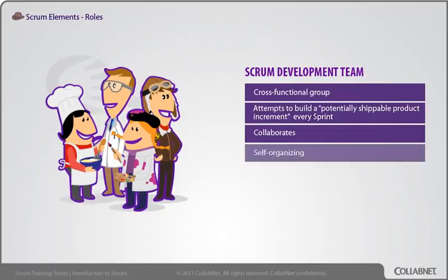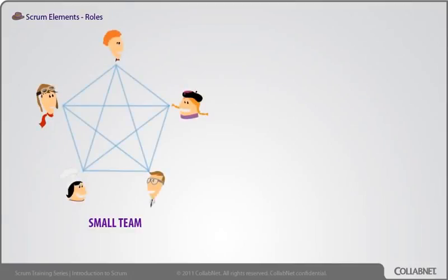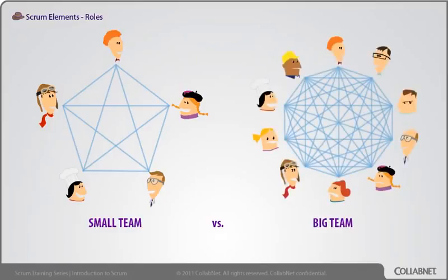There is no externally imposed hierarchy or job titles on this team. We leave openings for leadership to emerge naturally and for control to flow from person to person. The Scrum Development Team is a small group of people, ideally between 4 and 9 people. We have millions of years of practice dealing with groups about the size of a family. Large teams don't self-organize effectively until they've divided into smaller teams, ideally feature teams with minimal interdependencies.